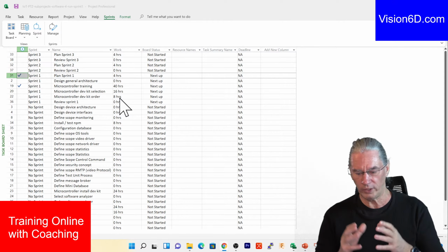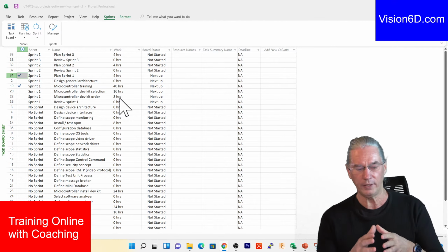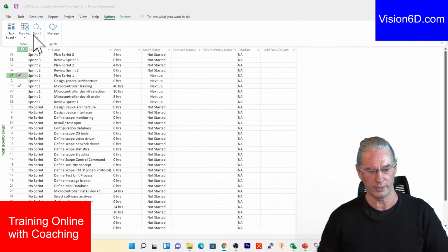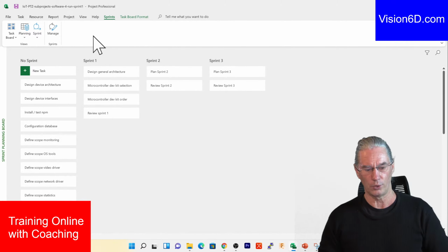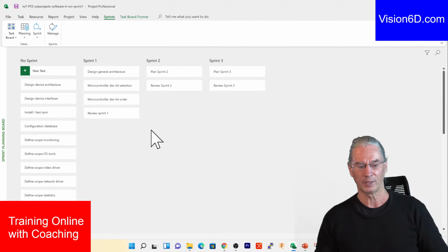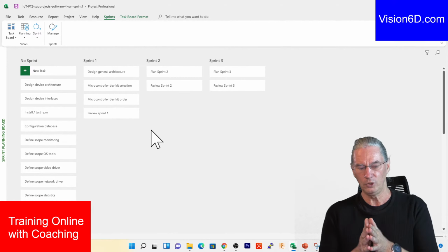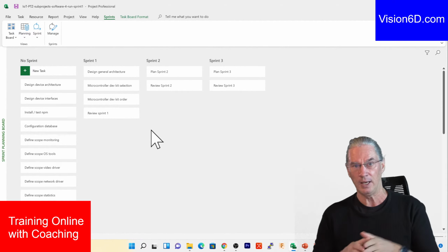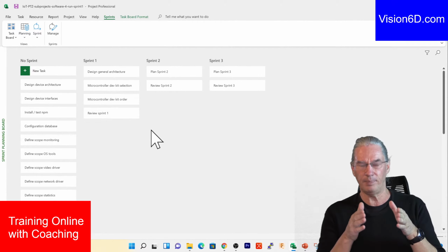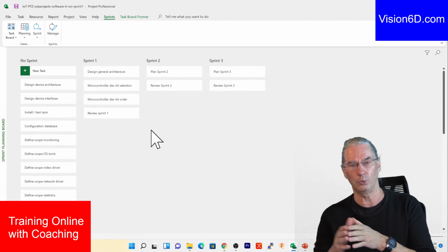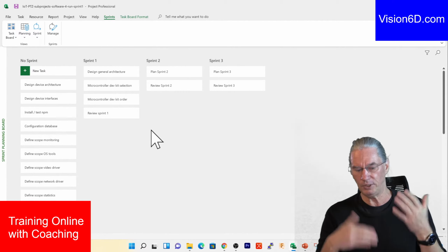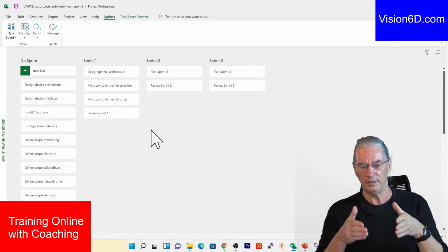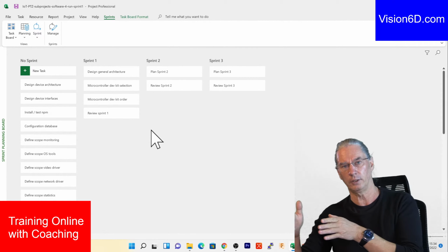And what we noticed is that when you have a beginning of a project like we are here into those initial sprints, there is no need to be really precise in your estimations, because estimations depend on the difficulty of the work, they depend on the speed at which the team can work, and teams are also evolving during a project.